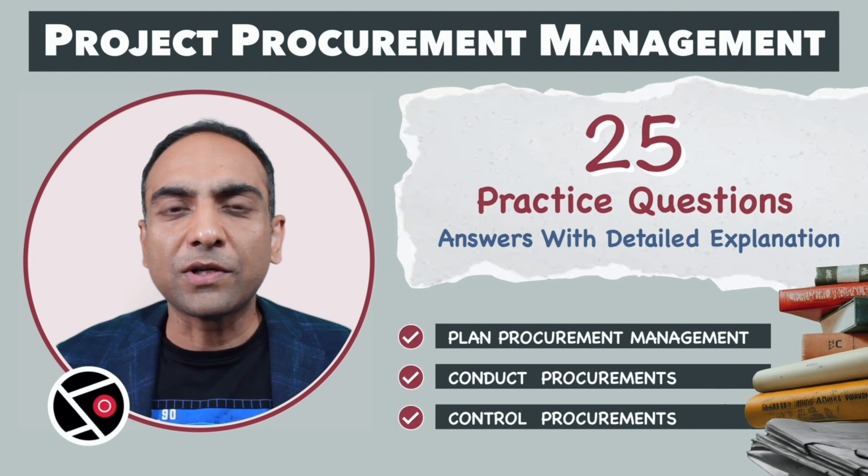This part of the statement is incorrect. Contract might put restrictions or limits on the supplier. For example, some contracts might require the work to be done at a specific location. Others might require the seller to use the same development process as the supplier. Such restrictions are common. D is incorrect. So D is our choice.